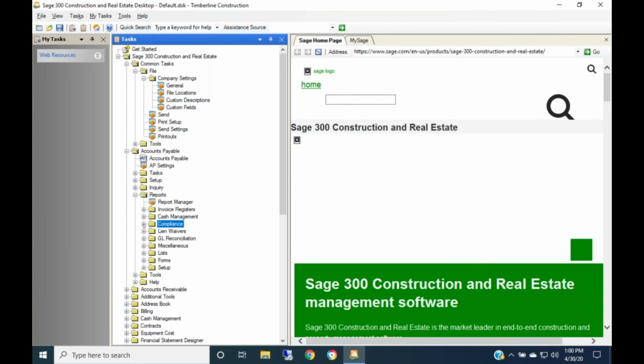And we do have a question as well. Okay, go ahead. Do these lien waiver reports pull in multiple invoices when payments are made, or do they print one report for each invoice? No, it'll be for the dollar amount of the check. And so there can be multiple invoices on that check, but it would be by job.